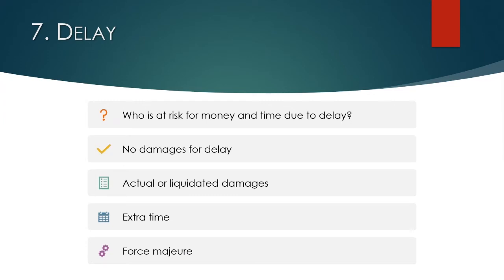And what are those actual damages? Those will have to be proven later. And at the end of the project, you won't know the magnitude of damages that you may be facing. And it could be more than what you could have negotiated in an LD clause. Force majeure is on this slide, a relevant topic, but we'll come back to that in our next section.